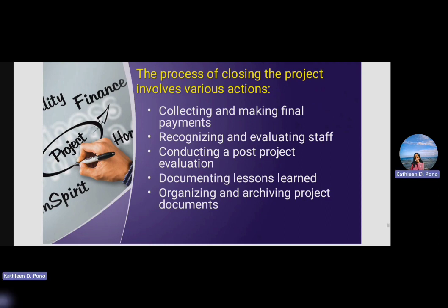Next is documenting lessons learned. This means capturing and documenting the knowledge and insights gained from the project, including what worked well and what could have been improved. The actions involved may include creating a lessons learned document, holding a debriefing session with the project team, and documenting the best practices and recommendations for future projects.